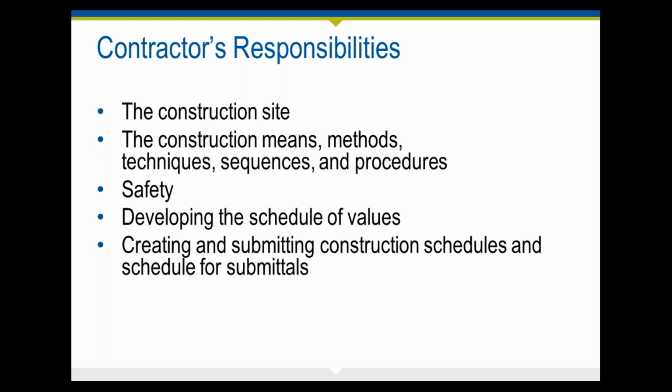Anytime I do this presentation on construction phase responsibilities, the topic of responsibility for safety comes up. And really, again, safety is generally the responsibility of the contractor, and it usually lies just with the contractor. Unless you as a firm are providing fairly specialized services on a mega project where you're taking on responsibility for safety as a specialized service and you're reviewing safety plans and providing that kind of specialized service, which can be done. It's a specialized service. In a typical role, the design firm does not have any responsibility for site safety. That is typically the contractor's responsibility.